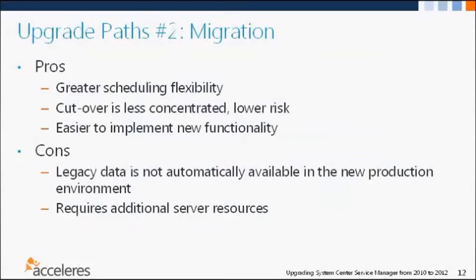And I'll go to the next slide. There are still some cons here that we'll call out. So again, greater scheduling flexibility. Your cutover process is much less concentrated. It's not an event that needs to occur over a weekend now. It's something that you can build up to. You have a lot more time to do testing because all of that can be done ahead of your cutover. And therefore, it's much lower risk. And because you've got the added scheduling flexibility and the extra time, it's much easier to implement new functionality because you're implementing it into production, and you can get all of your testing over with before you've committed to cutover.